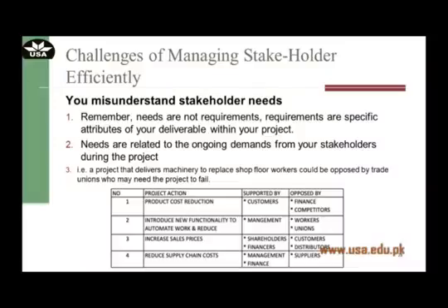One way a project manager can manage the relationship with all the different stakeholders is to group them, or to develop a grid that lets him know who is resistant and who is in support of certain managerial or project actions. For example, right in front of you, I have given an example of a table where each row represents one action that you are going to take, and each column represents whether they are supportive, or who the team members or people are that are going to be resistant to that very action.